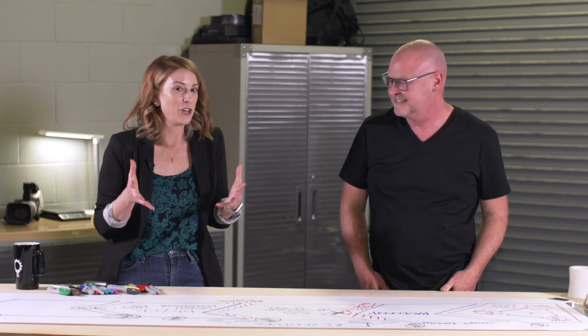So for Visioneering, when we do a design build project and we lock in a GMP, which is the guaranteed maximum price, we guarantee that the cost of the work that we agreed on up to this point will not exceed that dollar amount. If it does, and this is the cool thing if you're the pastor and you're the church, if it exceeds that dollar amount, guess who has to pay for it? Not you guys. That's right. So it ends up being Visioneering and our team. We made a promise that we could do that work for this amount, and if it goes over that amount, we end up figuring out how to make it work.